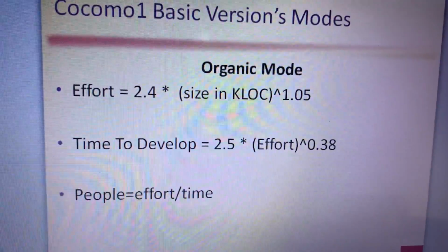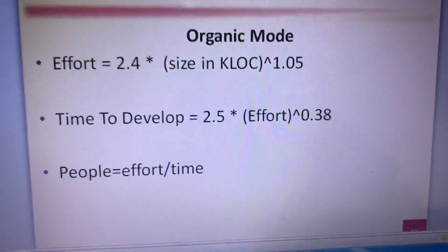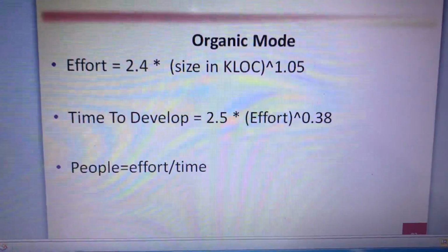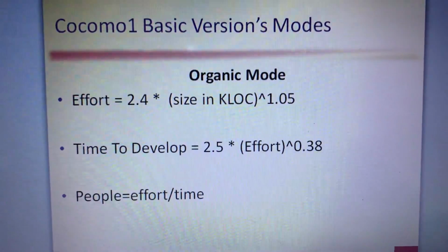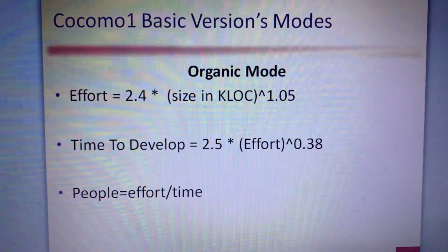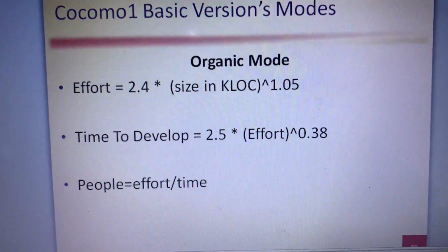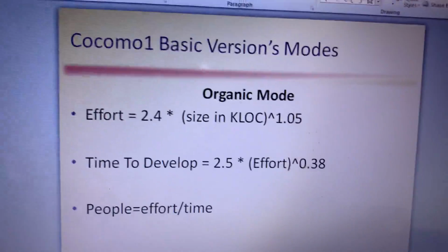I'm covering basic organic mode. The effort formula is 2.4 multiplied by size in KLOC, power 1.05, and time is 2.5 multiplied by effort, power 0.38, and then you can calculate people, effort over time. That's the COCOMO 1 basic.